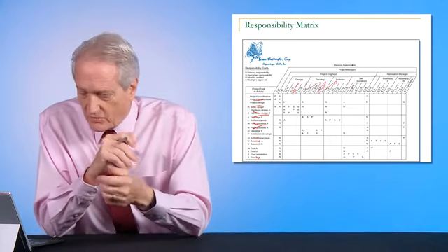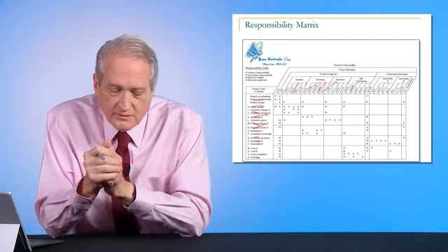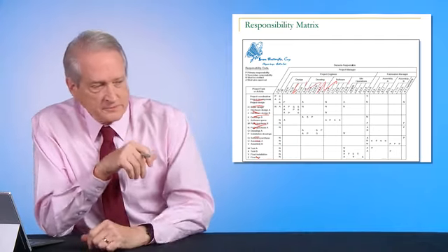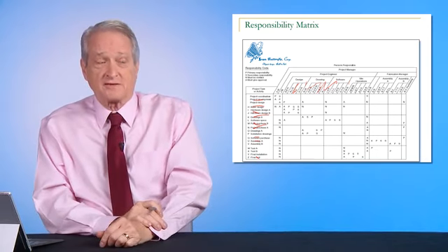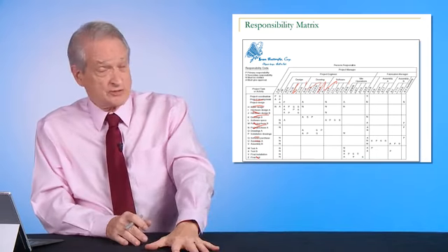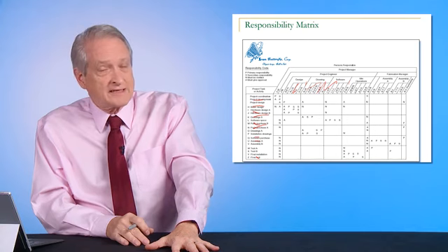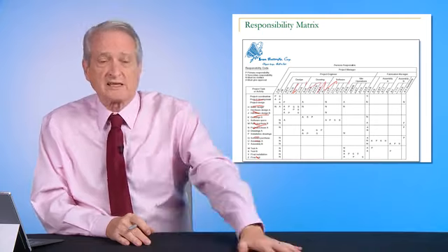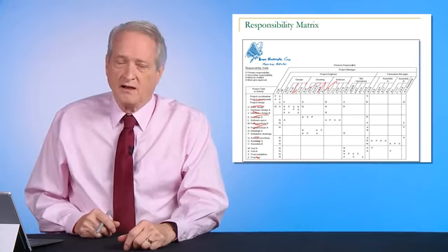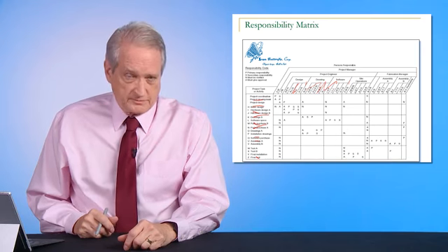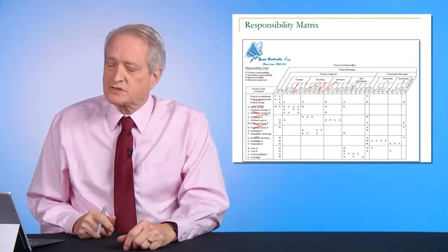We had outsourced part of the coding to a contractor. And halfway through the project, the contractor, the guy that was doing the coding, he didn't have a secondary, got a better offer. So he leaves all this uncommented code. Big hiccup. So you need to see who's responsible.